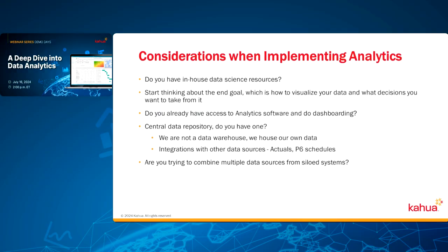If you want any other outside data in these dashboards we're looking at, it needs to be integrated into Kahua. A great example is our P6 or Microsoft Project integration. It's very easy for team members to upload a schedule right into Kahua. Once that data is imported, it's available to our analytics tools and can be used to visualize and see information there. But our analytics is not going to directly tie to P6 without going through that integration.